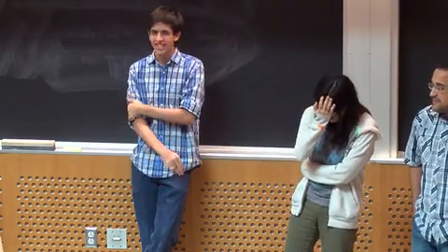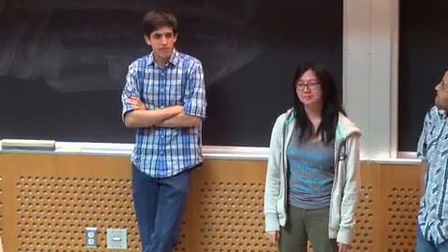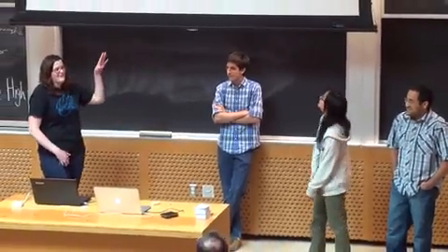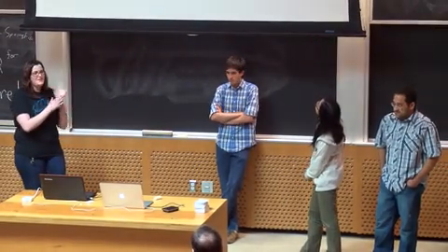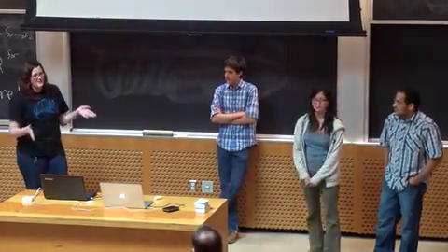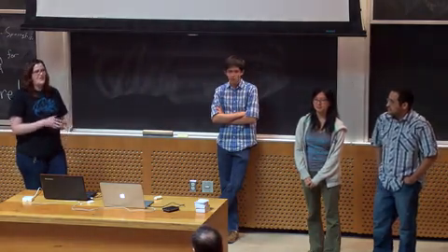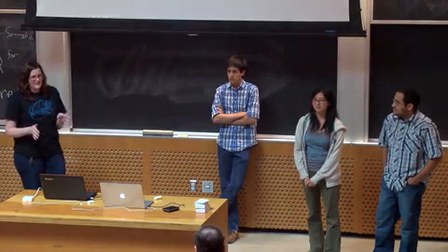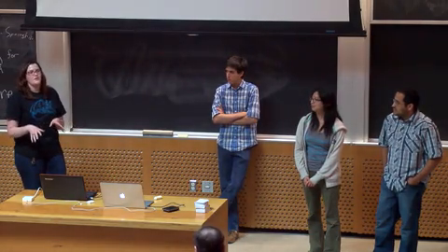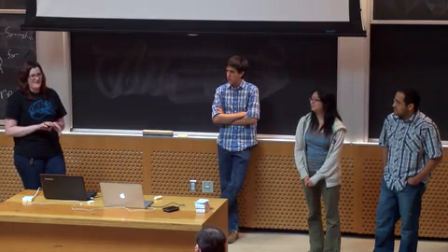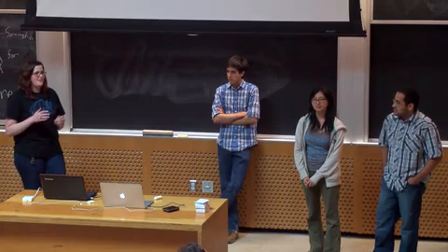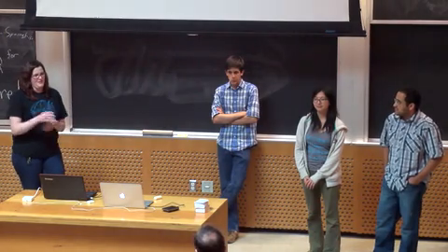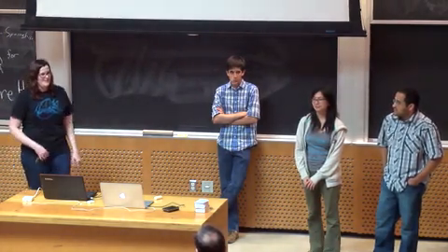So yeah, any questions? You had 2 points about deadlines up there, and I'm wondering if you... No, we did kind of keep to deadlines. What I was trying to say with that point is that we worked in those bursts to get to the deadline, but because it was such a long burst, by the end everyone was drained. A lot of little small things didn't get done, and so things were pushed back a little bit, and this led to more bursts. It was a really bad cycle that I think ended up happening.